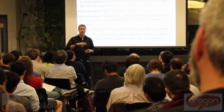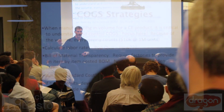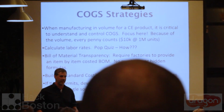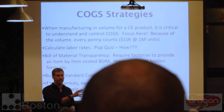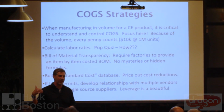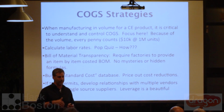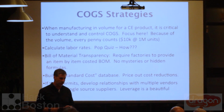But if you use a bootloader, which is basically a secure encryption in the code, and say you program that at Avnet, which is a special place in Hong Kong, not in China, where all the workers are scanned in and out, no pockets, no phones, basically secure, and then you consign that processor to the factory. Then you know exactly how many processors you ordered and how many products should come out. What happens is, and again, if you pick a good factory, it's never a problem. But if you had a bad factory, then they might build twice as many, and half of them go out the back door in a second shift. So that way you control it.